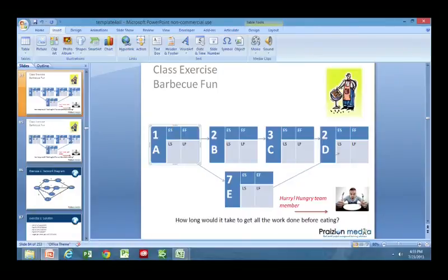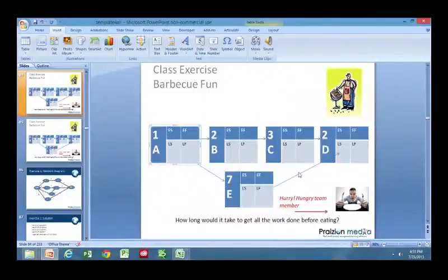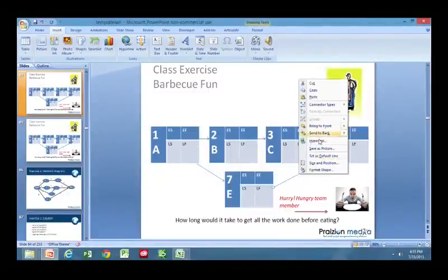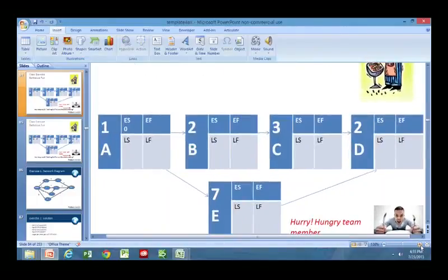Now 0 is a theoretical early start that enables us to compute the critical path in a more straightforward fashion than using the 1 method, which starts on day 1. So let me just walk you through the 0 method, and this shouldn't be too difficult to follow. Okay? So we're going to start using the 0 method by putting a 0 at the start of activity A. Okay? So activity A starts on day 0.